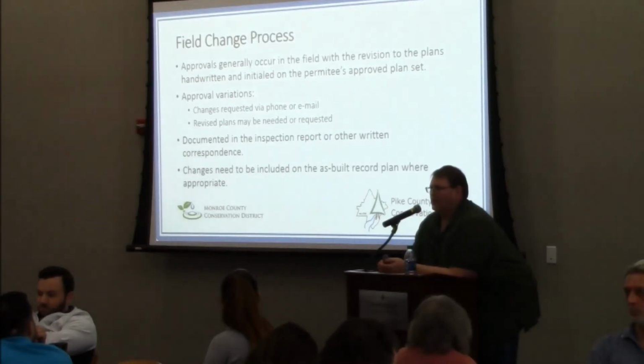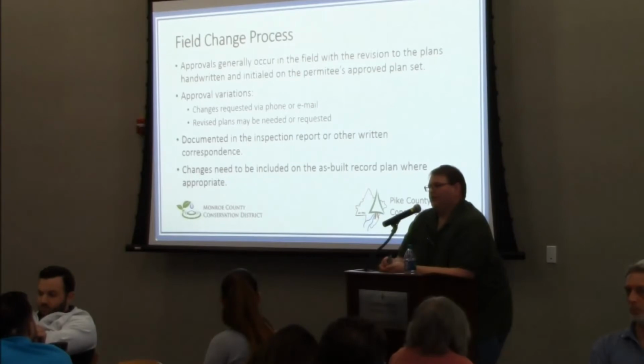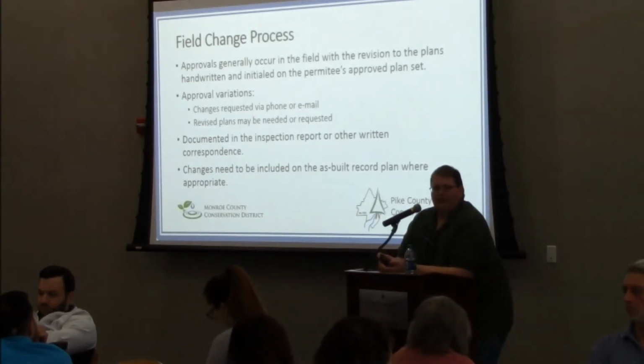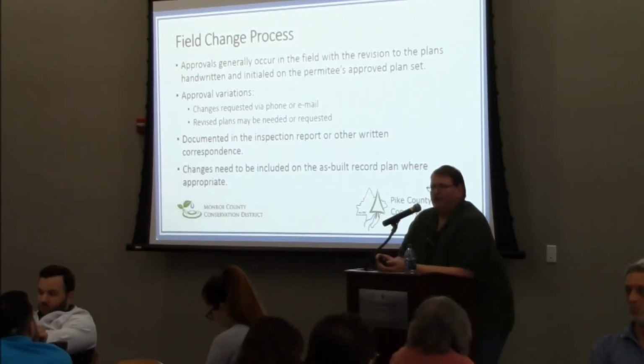A lot of times in Monroe, we'll get those revised plans via email. We'll look at them, we'll review them, and then we'll send an email saying, hey, these are good, fix them to your plans in the field, and we'll double check when we get out there next time we're doing the inspection. Whenever a field change is authorized, it's always followed up in the inspection report, and we write those every single time we come out. Regardless of if the site's squeaky clean and there's no issues, we'll say that in our inspection report. But every time we come out, there will be an inspection report that's done.